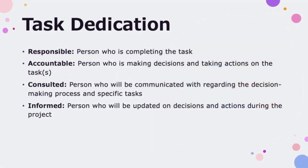The roles for task dedication in a RACI matrix are as follows. Responsible: the person who is completing the task. Accountable: the person who is making decisions and responsible for the task. Consulted: the person who will be communicated with regarding the decision-making process. Informed: the person who will be updated on decisions and actions on the task.